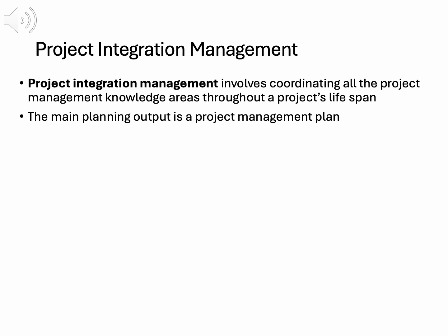For the just-in-time training project, this plan coordinates training course development, from defining scope to managing resources. It includes subsidiary plans, like the scope or schedule management plan, and provides a baseline for tracking progress. A baseline is a documented starting point, allowing you to measure performance and control changes.